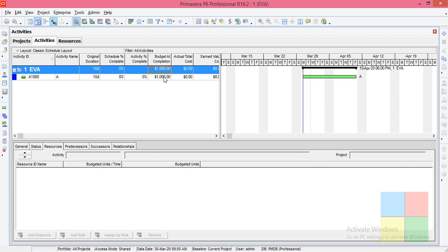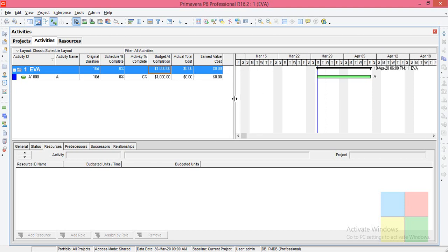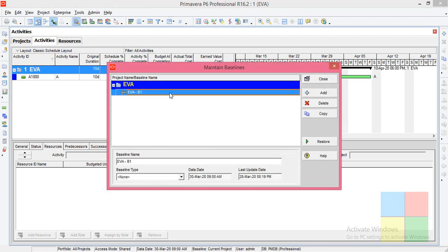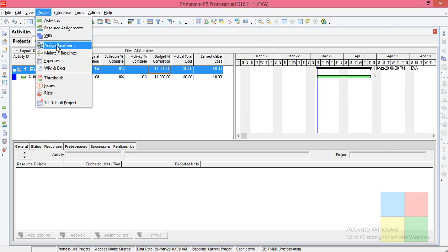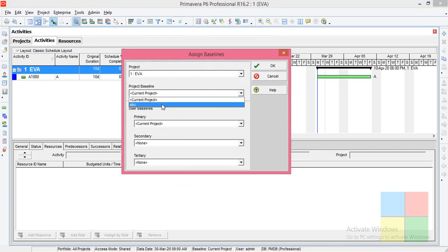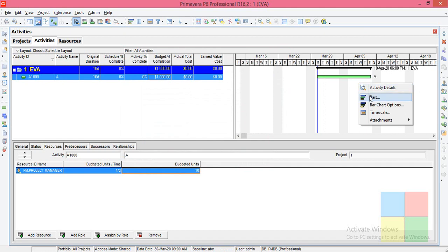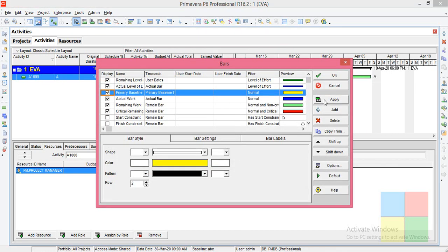So for 10 days the BAC (Budget at Completion) is 1000 — and I have it here: BAC 1000. That is what we are planning to spend. Now the next thing is to assign a baseline. Go to Project > Maintain Baseline, click Add, save a copy. Change its name to 'Initial Planning Baseline', then Save and Close. Go to Project > Assign Baseline, select the newly created baseline in the Project Baseline field, and also in Primary, then click OK.